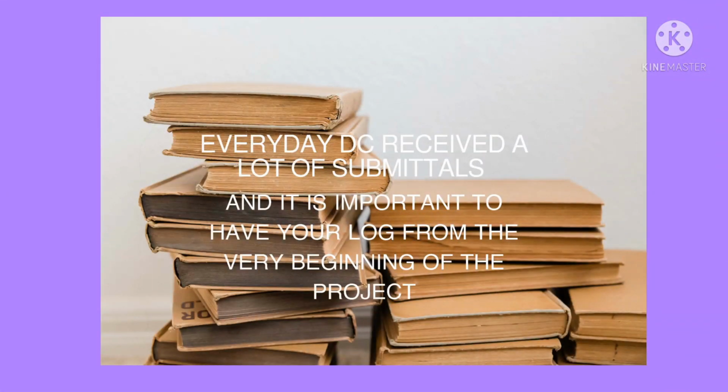Every day, the DC receives a lot of different types of documents. We have shop drawings, material submittals, inspection requests, method statements, everything, all the submittals you receive day by day, and you have to record all of this. So you need a submittal log that will make your life easier if you or your team are searching for something. This video will help you have an idea on how to do a submittal log.